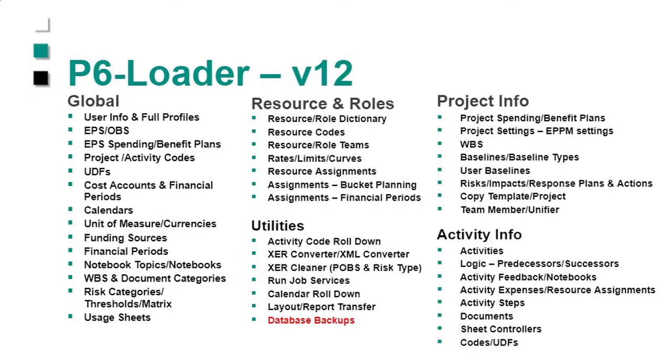I can read and write XERs and XMLs. I can clean XERs. I can even run job services. So after I finish a load, I can tell P6 to reschedule all the projects that I've updated. You can move layouts and reports from one database to another, and you can back up your database as well. All these things are available in the utilities.